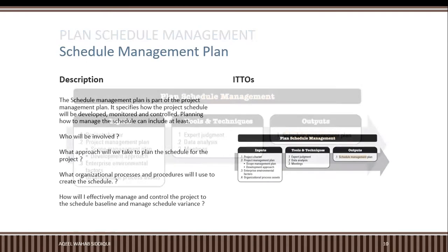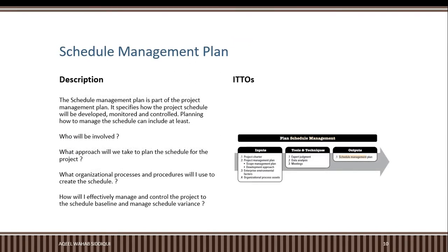So let's talk about inputs. The schedule management plan is part of the project management plan. It specifies how the project schedule will be developed, monitored, and controlled. Planning how to manage the schedule can include at least who will be involved, what approach will we take to plan the schedule for the project, what organizational processes and procedures will I use to create the schedule, and how will I effectively manage and control the project to the schedule baseline and manage schedule variances.